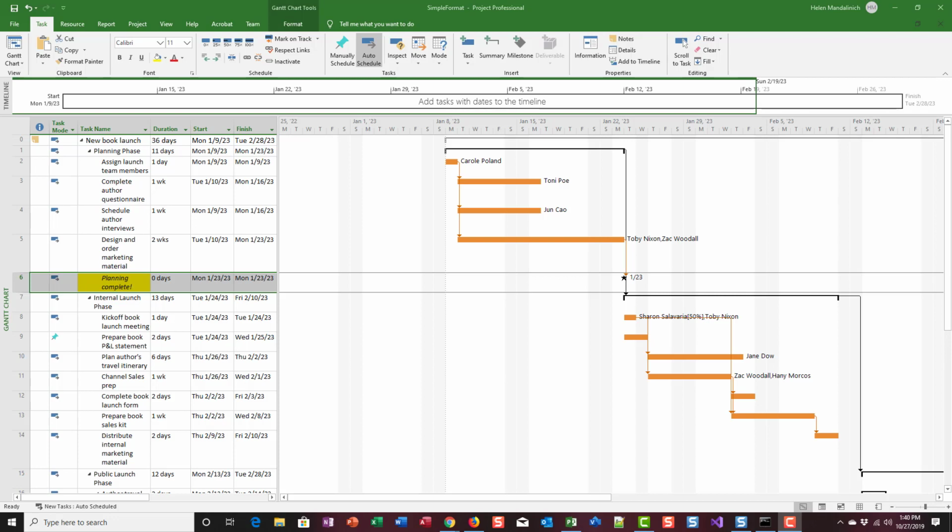So if you look in your chapter on page 134, there's really 3 ways that you can put a task onto a timeline. You can click on a timeline, format, insert existing. You can click on the task that you want to appear and, in the properties group, add it to timeline, or you can right click on the task and add to timeline with the shortcut. Let's do all three of them, so you can see which one you like.